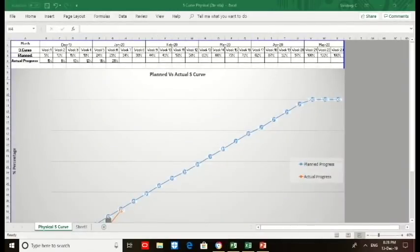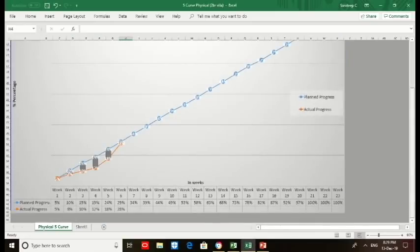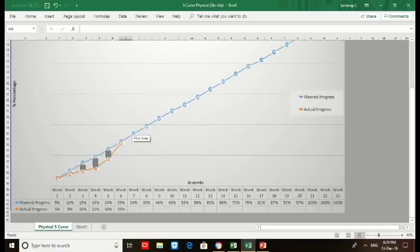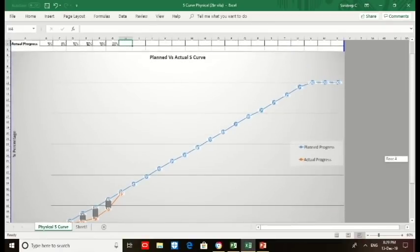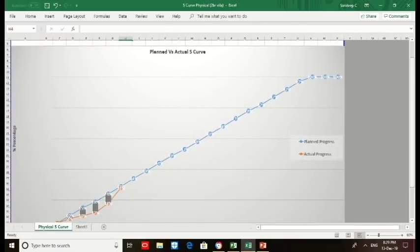You could see here that we have updated the actual progress in the week one column, week two column, week three column, week four column, week five column, week six column. Here we can easily notice the difference in each week against the planned progress. We can see what is lagging in the progress, whether we are behind the progress or closer to the progress or higher the progress. This way we can create physical S-curve and monitor the actual progress. Thanks for giving me an opportunity to present how to obtain physical and actual progress curve through Microsoft Project in the easiest way. I'll be coming up with new course, new content in the next upcoming videos. Thank you for watching.